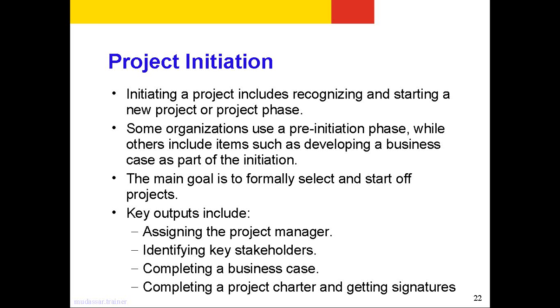Okay, and the key inputs include assigning the project manager, identifying the stakeholders, completing a business case, and then completing a project charter and getting the signatures. These are the rough number of activities you perform in the project initiation.